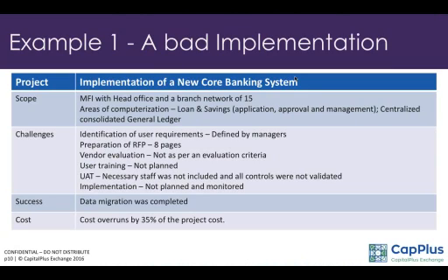To document a loan process and your general ledger and look at your MIS, plus put down all your inputs, outputs, validations, controls, and reports in detail, when you document it, it will definitely be more than 50 pages. So if you see an RFP with 8 pages, please don't go ahead, because you will end up in trouble.